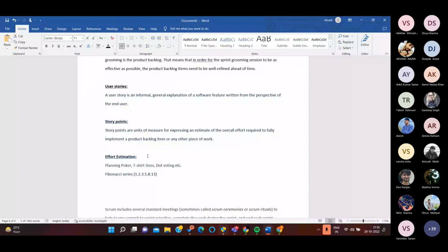And inside each user story would be the tasks, like what exactly the front end engineer needs to do in that, what exactly the back end engineer needs to do in that, and how exactly the testing would be done after that. So that is how it goes. It is like the milestones, then the epics, then the user stories, and then the tasks. That is the funneled process of the entire thing.